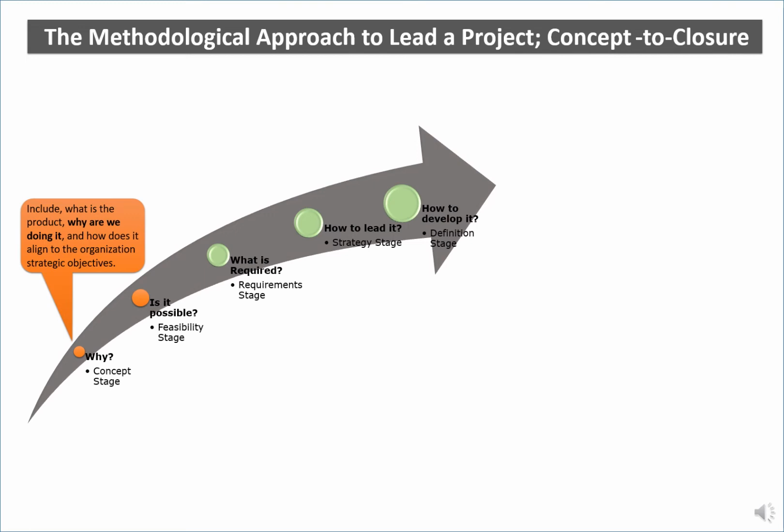Now, once the organization, senior executive management, or whoever has the power to decide, goes through gate 1, then ideally we believe they should appoint a sponsor or a project executive, depending on what you'd like to call that person, or project owner or product owner, you name it, whatever you wish. And we also strongly recommend the appointment of a project manager. And the idea is now we need to go from the project brief and the concept to do